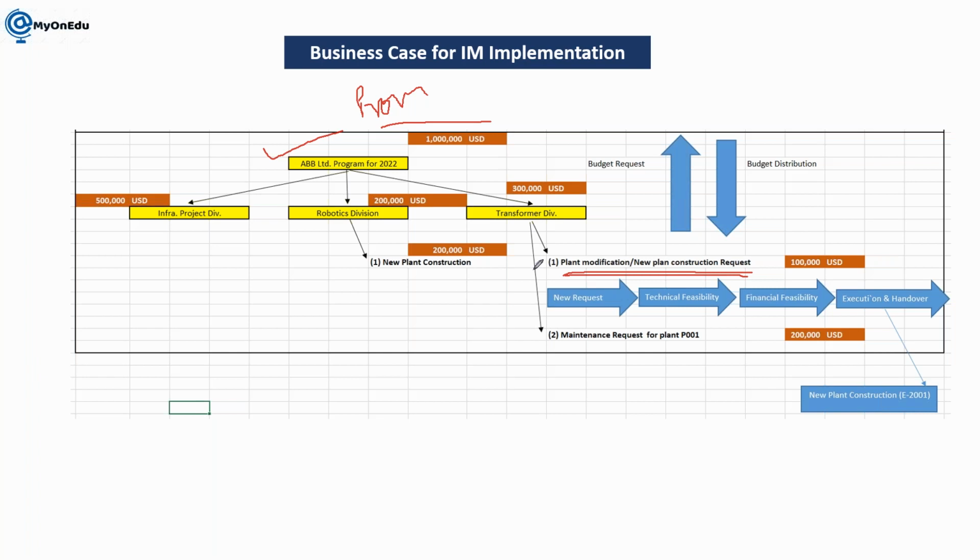These individual proposals or projects will be created under the last level of positions. Wherever it is a proposal, it will be created in the form of an AR, appropriation request. And where it is already confirmed that the project needs to be processed, in that case the project will be created and assigned to the last level of position.